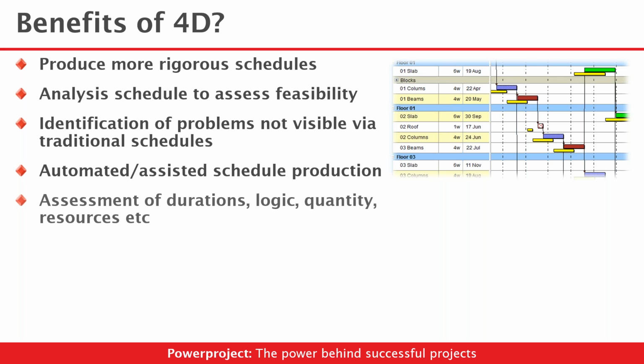And it may be also that we can help with managing our resources. We may utilize the site better by helping us understand where on the site the different tasks are taking place. So if we can show that in a given week, we've got all our resources concentrated in only one corner of the site, that may mean there's whole areas of the site which have been neglected. And if we put our resources into those areas, we could perhaps accelerate our schedule.